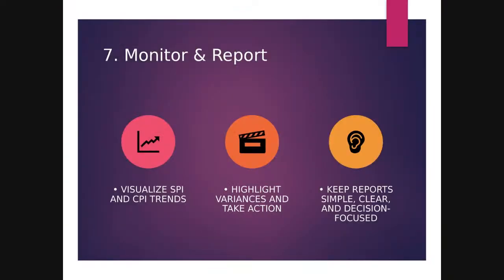All right. The next part is the monitoring and reporting, which is where management comes in. We want to be able to visualize the trends. So if your CPI is always sub one, the end is evident, right? If your SPI is always above the one, it's also a good time to ask questions. How are you performing so well? Did you pad? And this is how the government uses earned value metrics.